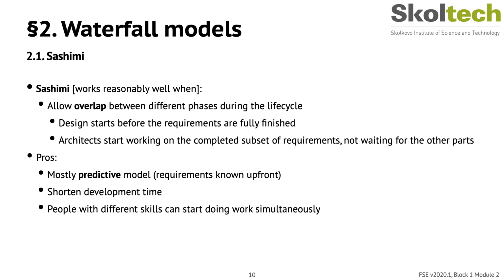And of course, it's a pretty predictive model, so you still have to know all of your requirements up front. But what it allows you to do is shorten your development time, because you can start doing things simultaneously by people with different skills who can start doing work before it's fully finished in the previous stage.